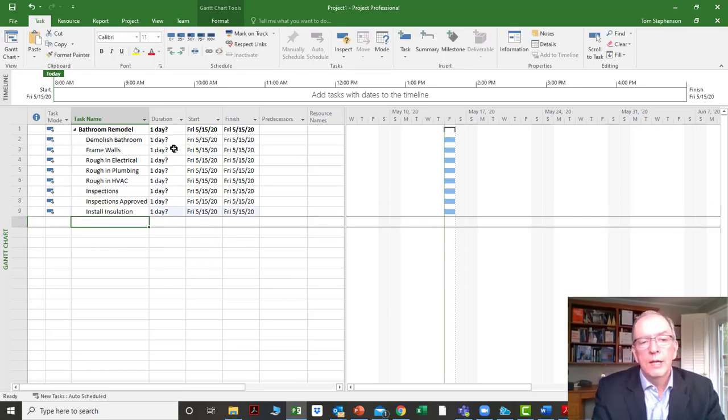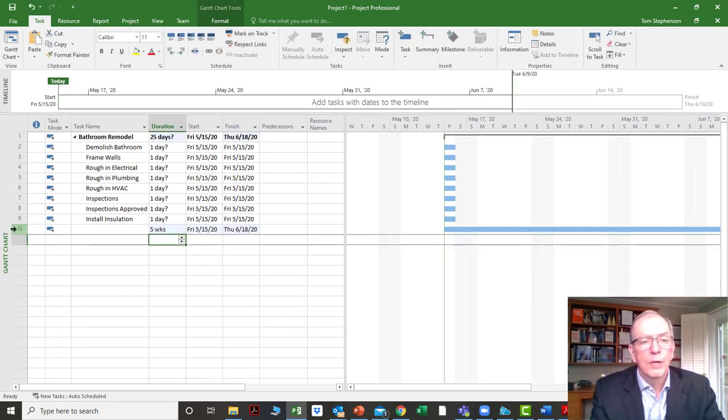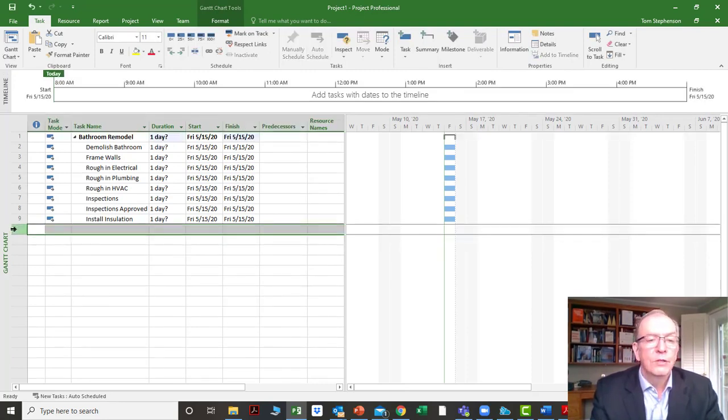We also in the last tutorial went over the different ways that you can enter durations. Just entering a number will enter days, or putting 5D will put 5 days, or 5W will put 5 weeks. As an example, if I put 5W here, you'll see something show up for 5 weeks. Same thing for hours, 5H, 5M for minutes, and 5MO for months.